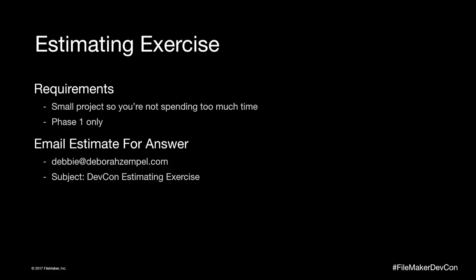Well, the follow-up to that is that when you get a deliverable to the client and then they need to go through and review it in a timely basis so that you can make changes and get it back to them. Yep. And then they don't respond in time. That's the other issue. That's where your contract comes in handy. Because the storyboard is just your blueprint, but the contract, those are all the words that say, I will get this done in X amount of days as long as you're not a problem. In other words. But yes, that's where your contract comes in.